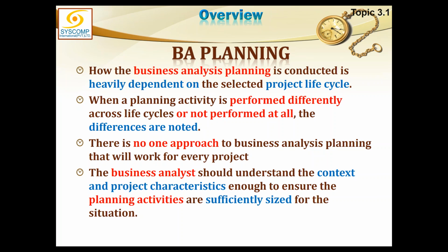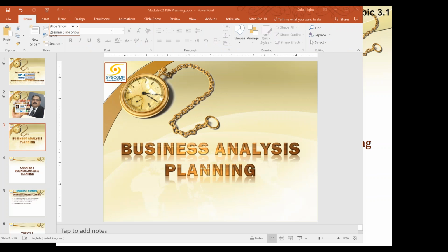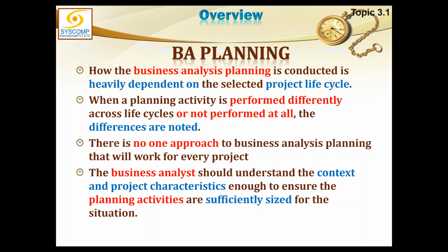Only in those cases where you do not have some predefined organization-mandated project life cycle, you will look at your project. The first option you have is to look at the industry practices. If I am doing a mechanical project, then you must see how people do mechanical projects. Is there a standard life cycle for that? If there is, then we will follow that. If I cannot find a life cycle, only then I will create my own life cycle for a project.